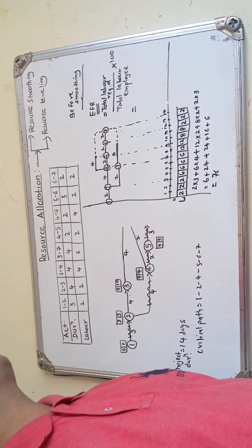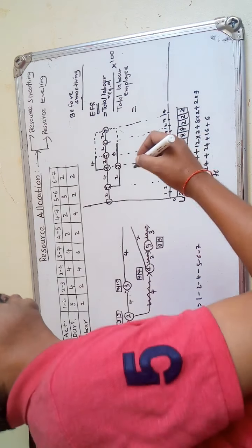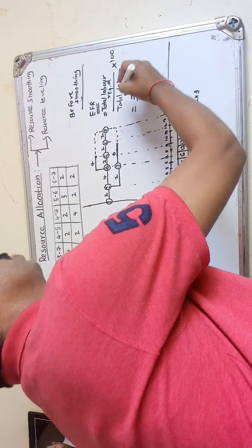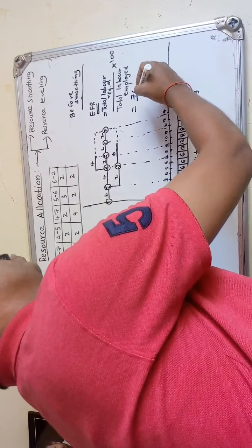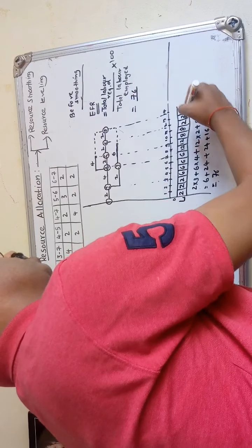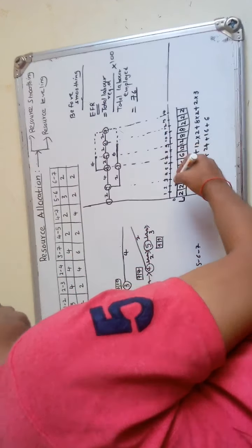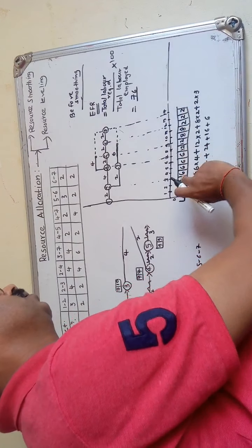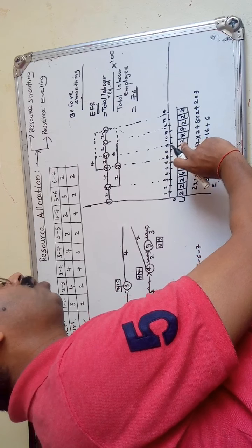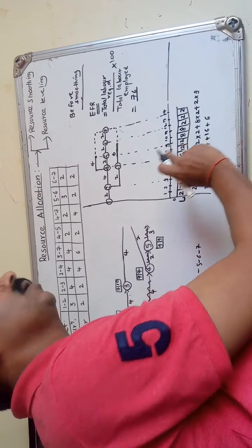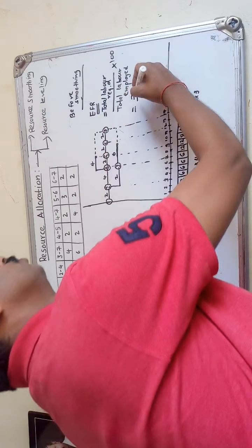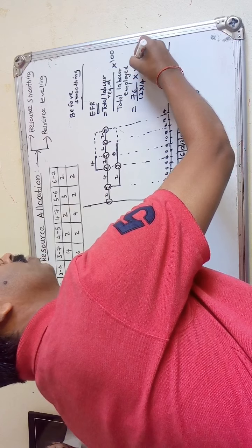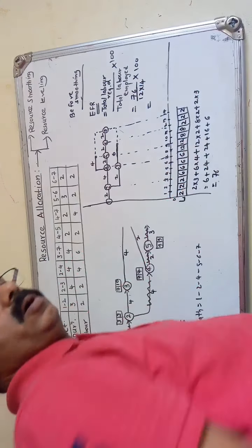And how many we have employed, that we will see. So total labor required is 76 upon the total labor employed. The maximum labor we have employed, from each requirement, for this small project is 12. So 12 labor for how many days? 14 days, into 100. So you have to solve it, the effective force ratio.